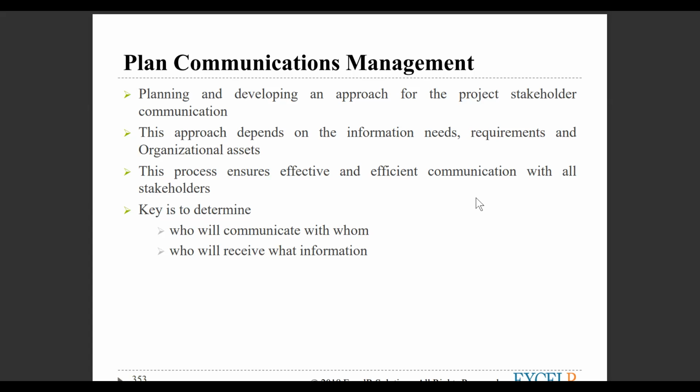The resource wants to be in the good books of the stakeholder. So what will happen? Even a small activity can lead to a new change request. That new change request can lead to some sort of monetary benefit, and that monetary benefit you will be losing. Right? So never ever allow the stakeholder to interfere with your resources. That's the protocol you need to set. That's the communication management you need to prepare.